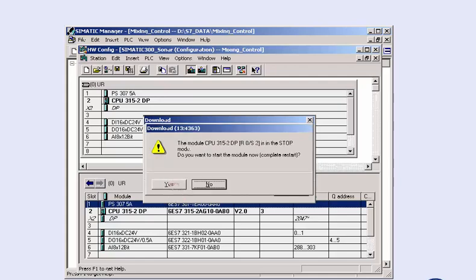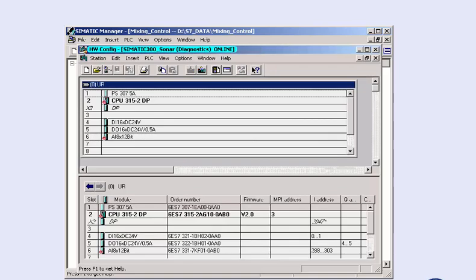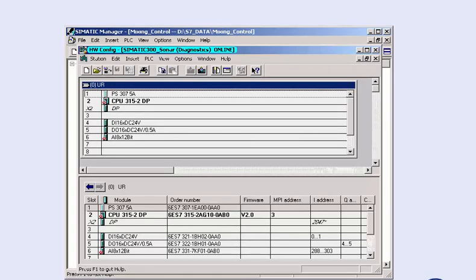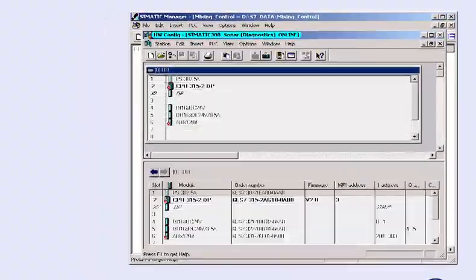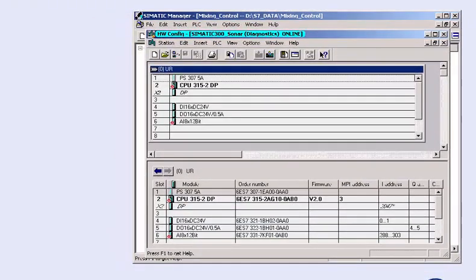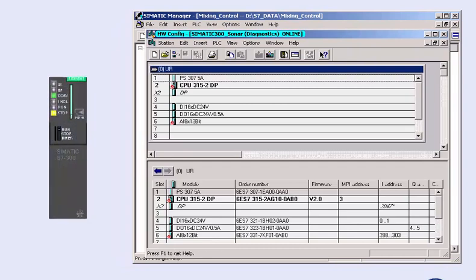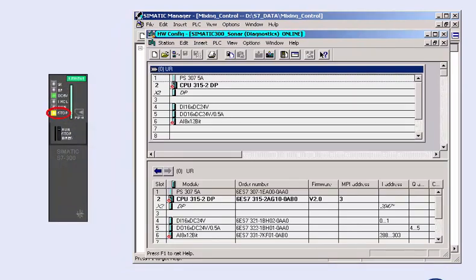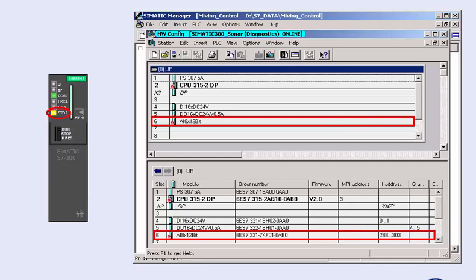After switching on during the startup, the CPU compares the configured set point configuration with the actual configuration. In our example, the CPU is programmed to immediately change to stop mode if there is any deviation. In this case, it is a definite indicator that the actual hardware setup differs from that specified by the project planner.